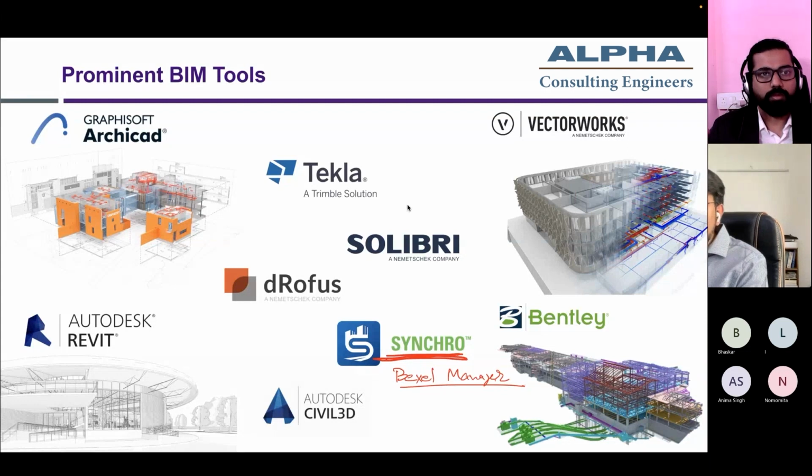You can see the building being constructed activity by activity, and you can see what particular challenges can come, which you might have ignored when you are just using a spreadsheet or just discussion. Then you can have iterations about those activities or the deployment of resources for the said activity, and change your course of action before the actual construction has even commenced.